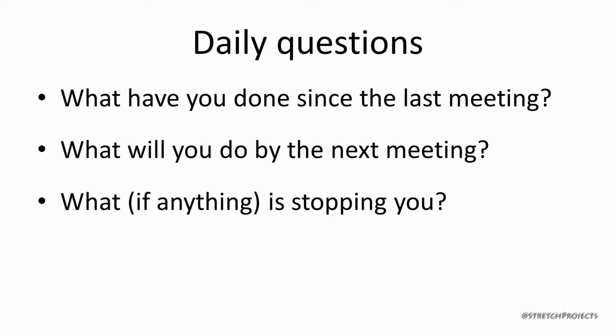So what happens during these daily meetings? Well, simply put, every single member of the team is asked 3 simple questions which they provide answers to. Those questions are: what have you done since the last meeting? What are you going to do before the next meeting? And what's stopping you, if anything?